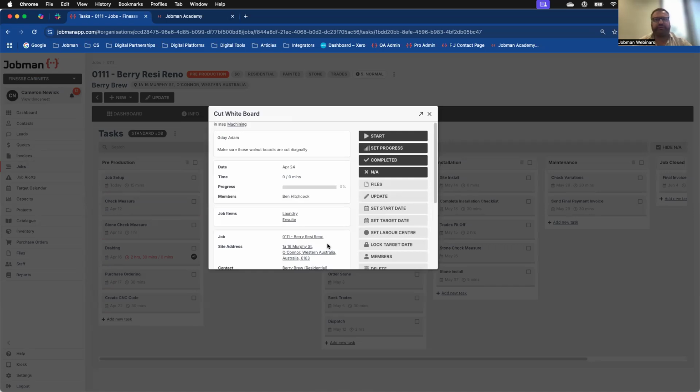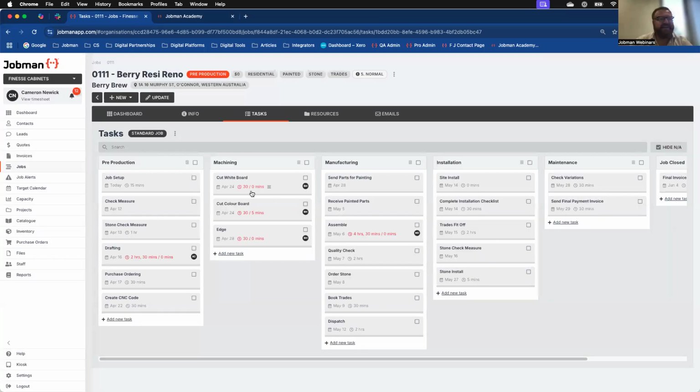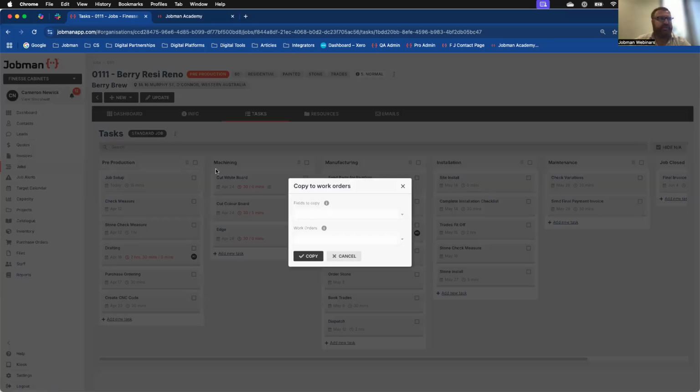And this is most useful, like I said, for companies that like to operate for machines and teams. So if I had two different machining operations here, CNC1 and CNC2, for example, or I had an assembly team, 1, 2, 3, 4, 5, utilizing labor centers now makes it really easy to be able to turn around and take this information and allocate your scheduling and capacity based on those areas rather than individuals, which just makes for a much cleaner operation in the software.